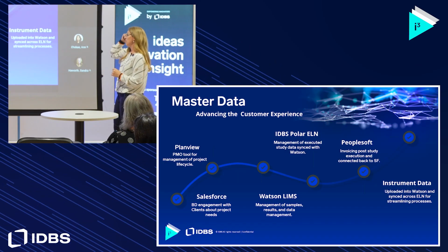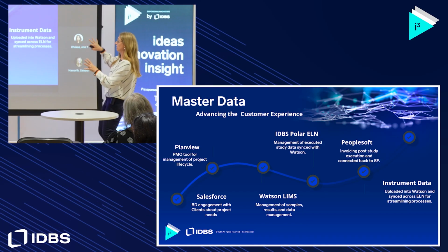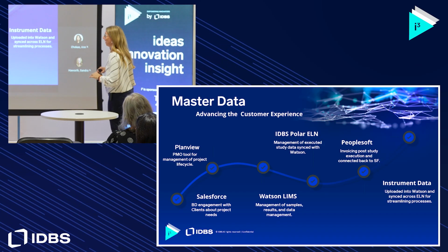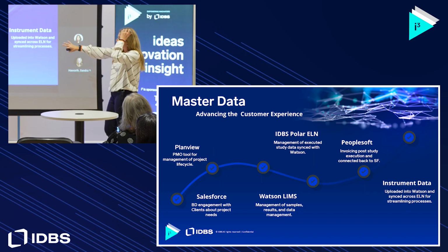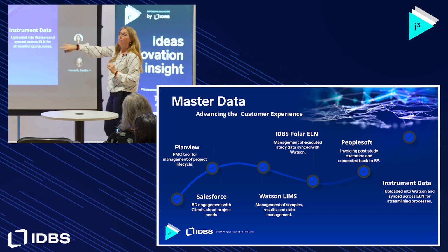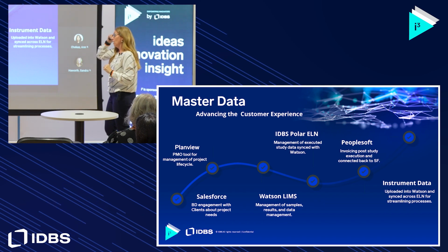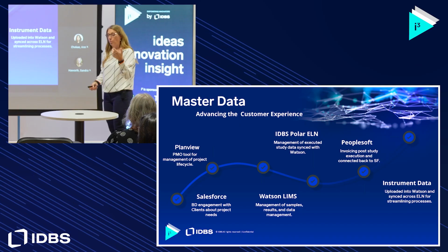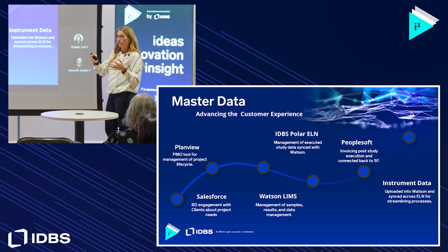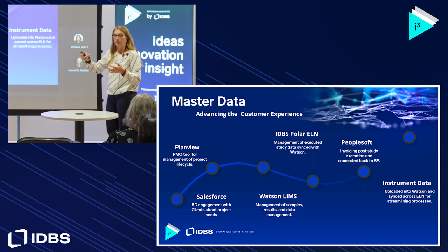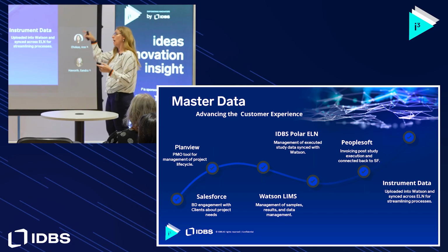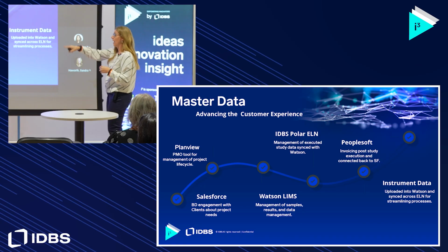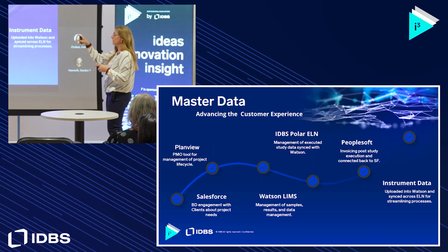All right, so like I mentioned earlier, this is our master data flow for biosciences, not the rest of specialty labs, or at least not yet. The integration between Salesforce and PlanView is automatic. Whenever our BD team is engaging with clients and a project or proposal is signed, they go to Salesforce and change the status of that quote. Then that's the trigger to automatically create the study in PlanView. PlanView is our project management tool. That integration happens overnight, once a day.